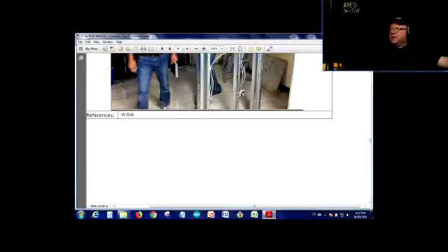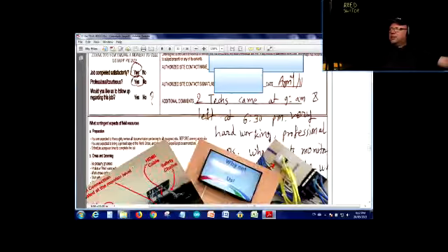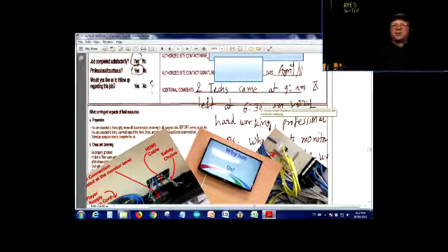Okay? And of course, the famous deliverables. I put a great deal of stress on filling out the deliverables properly, because this is how you make sure that you get paid after you have done your job. You get the proper documentation. You can spend 6 months on doing the job. If you don't document it properly or the way they ask you, you can get paid less, or you can get the payment with a delay, or sometimes you just don't get paid at all. Very rarely, but it happens as well.